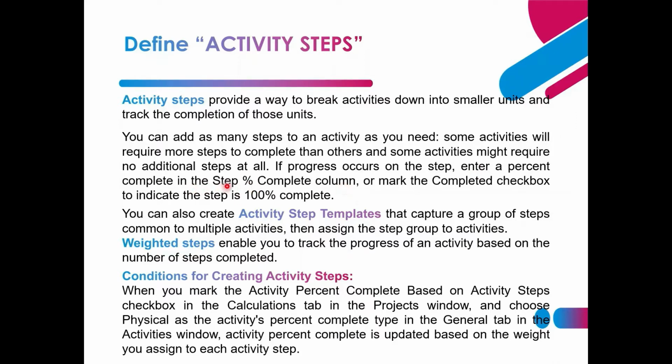There is a column where you can add the percentage completion of those steps, or mark the completed checkbox to indicate the step is 100% complete. You can also create activity step templates that capture a group of steps common to multiple activities. Weighted steps enable you to track the progress of an activity based on the number of steps completed.